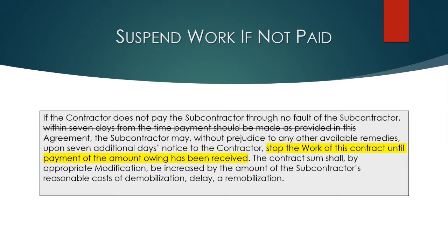Of note, you have to provide notice. This contract language requires notice. If your language does not require notice expressly, we would suggest that you still provide reasonable notice. You want to look out for other provisions that may contradict this type of provision, such as a provision that requires you to continue performance, even if there's a dispute.